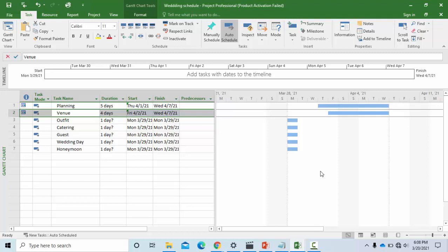We'll be able to look at subtasks. We'll be able to look at predecessors. We'll be able to look at constraints, deadlines. We'll be able to look at certain milestones. Majorly milestones are used to report to management, so it makes it easy for you to know what you would achieve as at a particular date. Milestones do not have durations, and so in the coming sessions we'll be able to look at all of this, but this section is just majorly focused on identifying all of the tasks, and also for us to be able to look at what are the properties of this task.